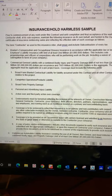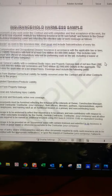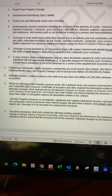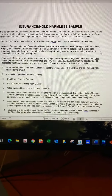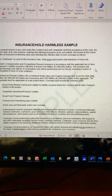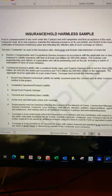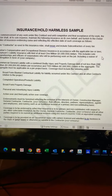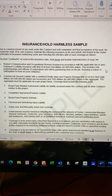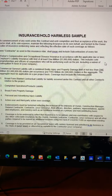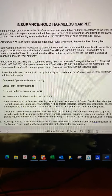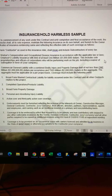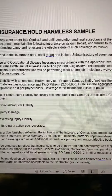If something goes wrong, we want to know who's going to be responsible. When you sign a contract it should have an indemnity and a hold harmless agreement. In California specifically, it's a type two indemnity in both commercial and residential. A type one indemnity says you're absolutely responsible — it doesn't matter whose fault it is. I've been doing this over 40 years and I've had some bizarre claims where responsibility gets flipped back by a type one hold harmless agreement. A type two is the one you want — it says you're responsible for what you did as a percentage.